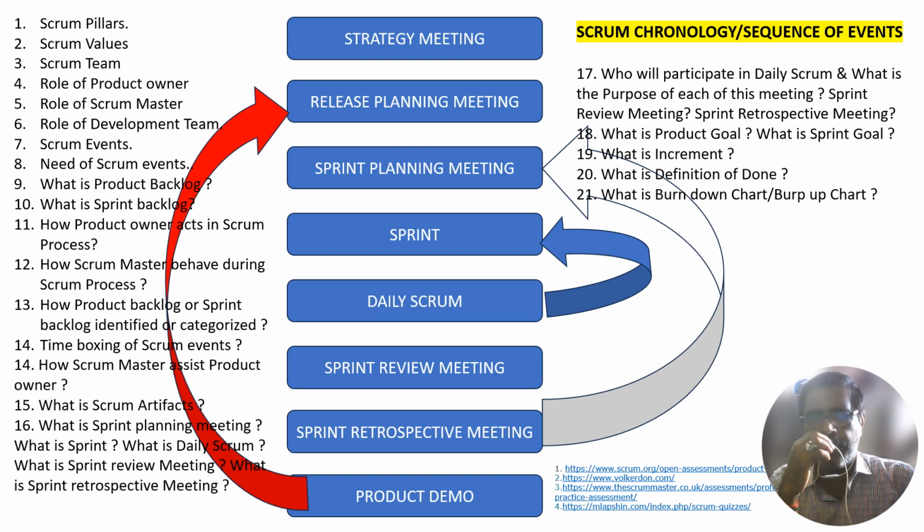So the daily Scrum is not the only time the developers are allowed to adjust their plan. They often meet throughout the day for more detailed discussions about adapting or replanning the rest of the sprint work. I already told the planning is continuous from end to end in Scrum, whereas in the waterfall, the planning is done at the initial phase.